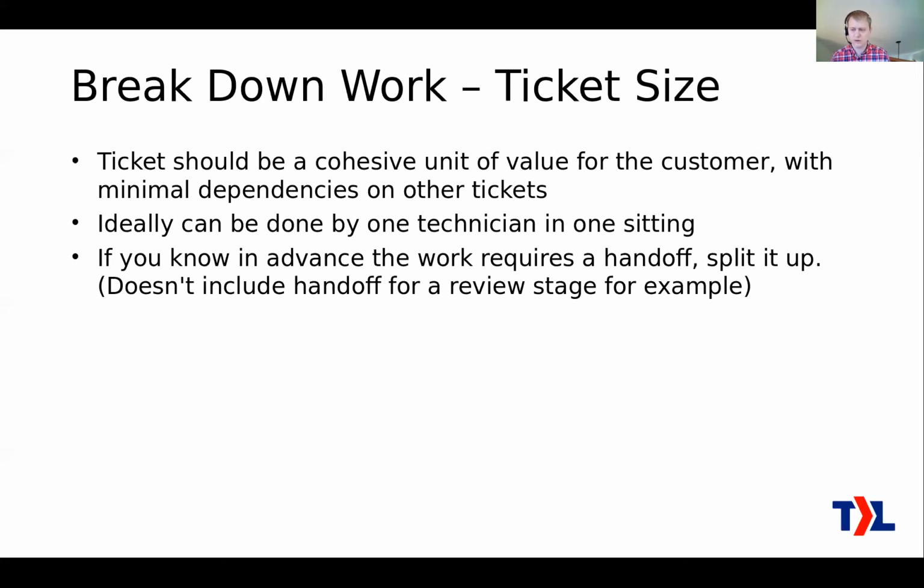If you know in advance that the work requires some sort of handoff, like between one engineer who's an expert on this and another engineer who's the expert on something else, try to avoid making that one ticket. Try to make that 2 tickets if you know it's going to involve a handoff like that. That's not including if you have something like a review stage where somebody does some work and then another technician takes a look at that to verify that. That doesn't apply. That's a great case for making columns on your Kanban board that represent that stage, where it moves from the in progress to a QA sort of stage.